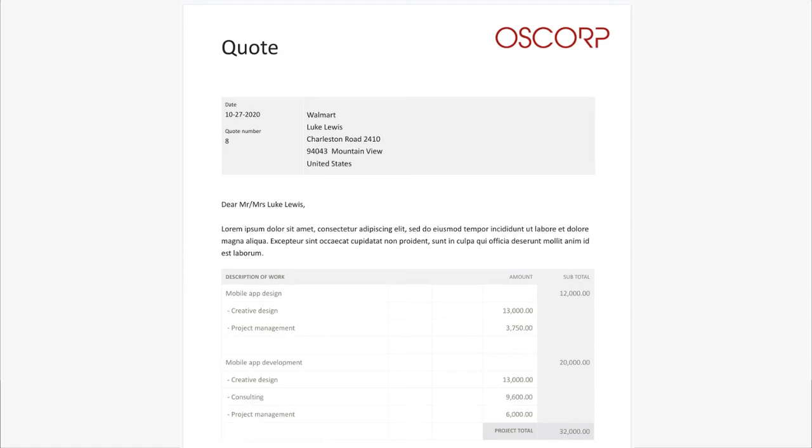What if the quote doesn't have some or all of the information that you need? Try using an invoice to find the missing information that you need. This is why you should study both your quotes and your invoices. Together, they should provide all of the information you need to build a generic project sheet that you can use as a template for your future projects.